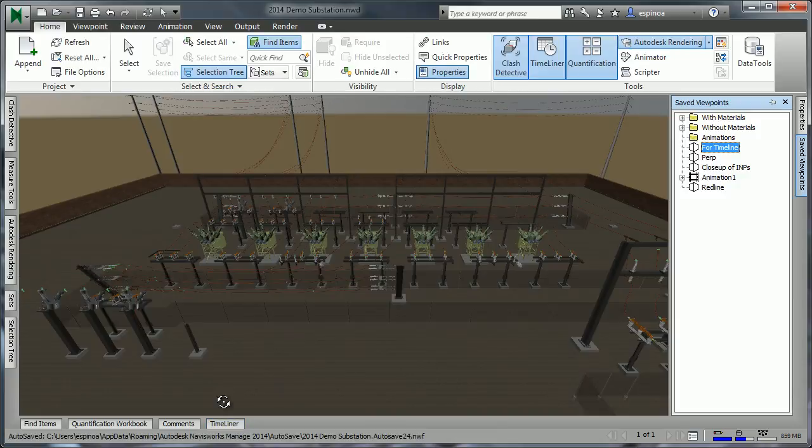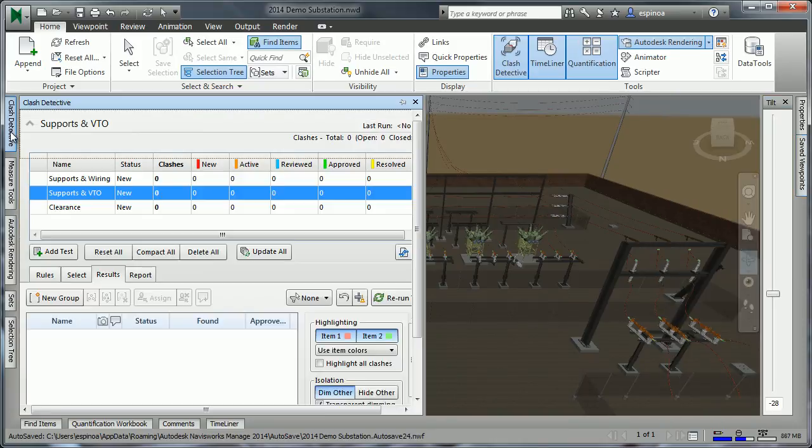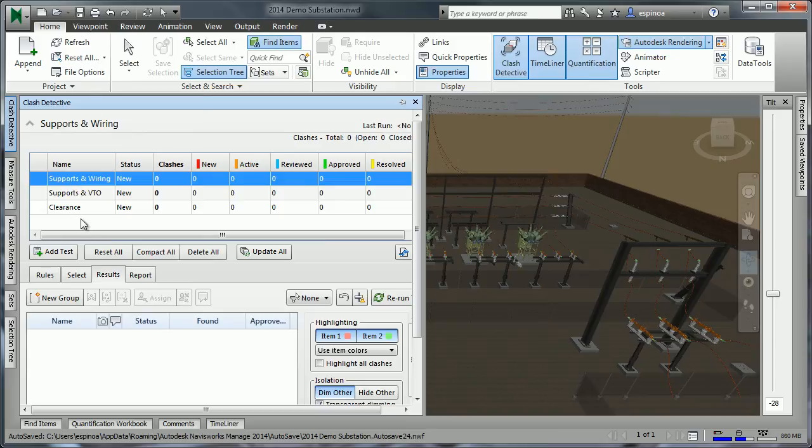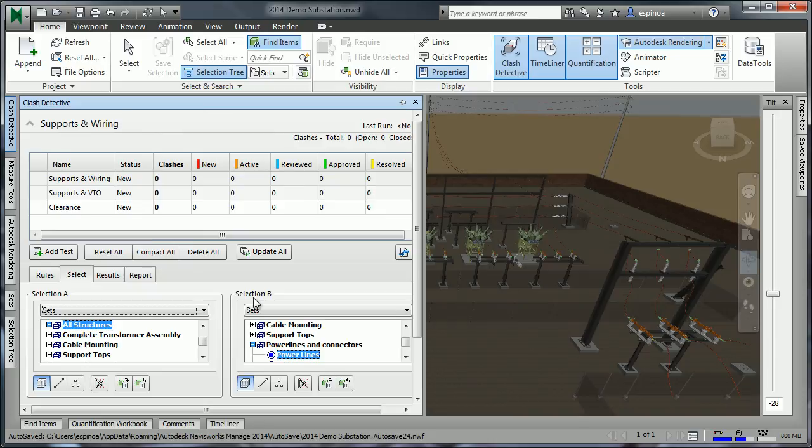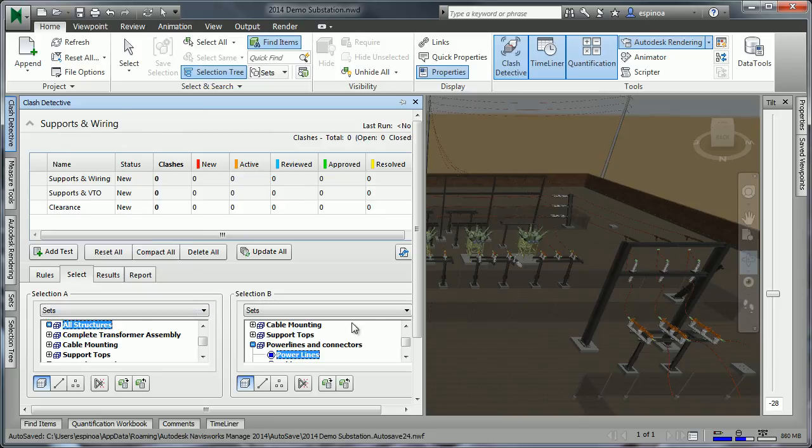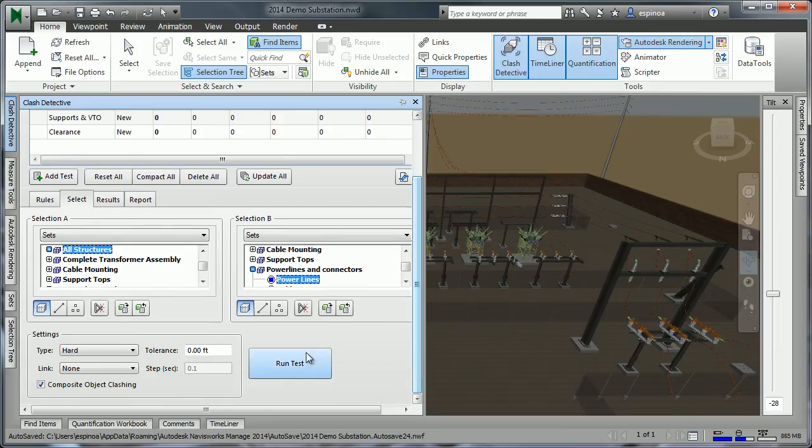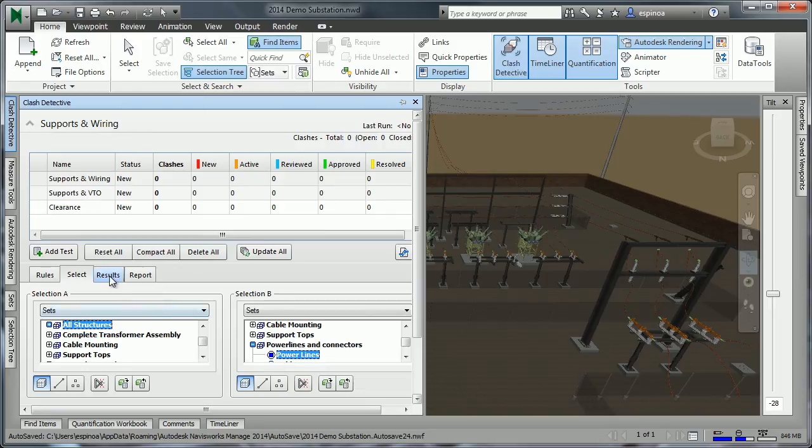One of the most important capabilities of Navisworks Manage is the ability to do clash detection. I already have three tests available, so we can see the results of these. One, supports versus wiring. On the selection tab, we can specify various ways of selection A versus selection B. So here I'm comparing all structures against the power lines. As we run the test, we're checking a hard clash with zero clearance. And the results, there was no clashes.